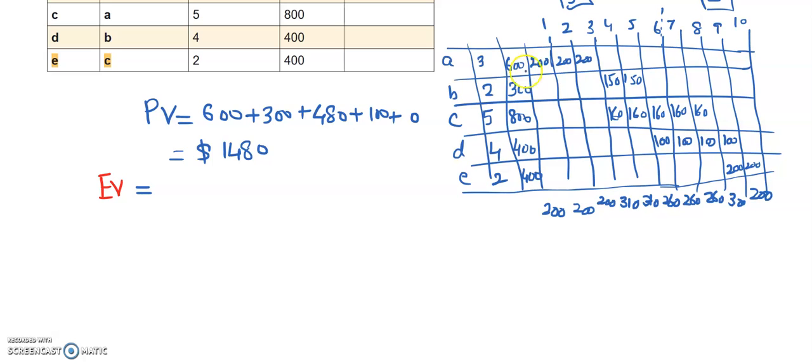So in this case, activity A is completed, at least it is scheduled to be completed, so we will consider it to be 100% complete, so it is 600. Activity B also completed, it will be considered as 300. Activity C and D are not completed at this point in time, so therefore we will take them as 0. So the total earned value will be then 900.